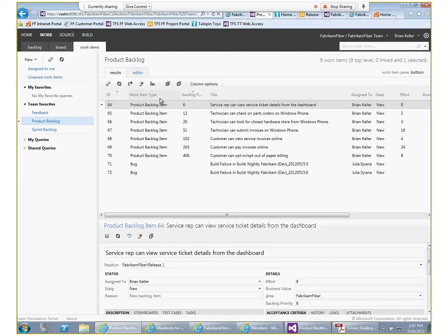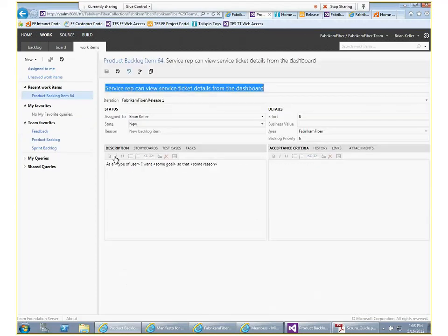Another very popular item that also comes here as a product backlog item is what we call the technical debt item, meaning that you have a list of things that you have to do, and you don't know exactly when this is going to be done, and you don't know how to add that to the project. Well, the answer is in Scrum as well. Add it to the backlog, and then we will prioritize it together, right? So the generic product backlog item is a way of doing this.